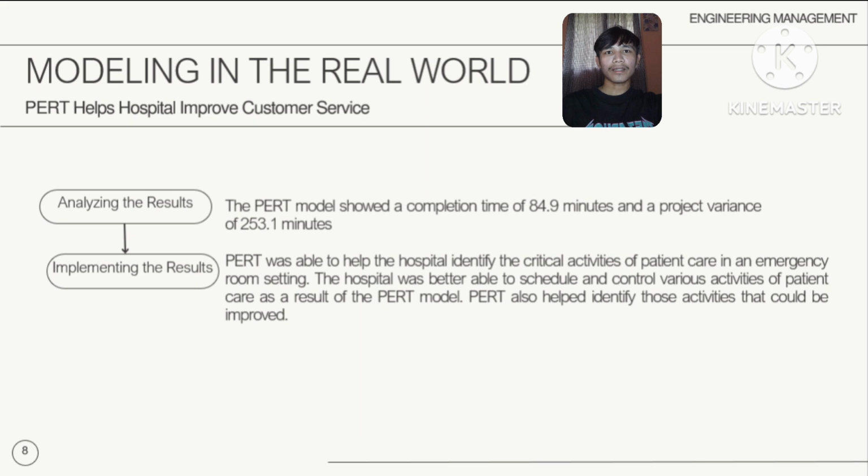The project variance was calculated as 253.1 minutes. This variance is a measure of the risk or uncertainty in that 84.9 minute estimate. High variance suggests that while the average time is 84.9 minutes, individual patient experience can differ significantly.